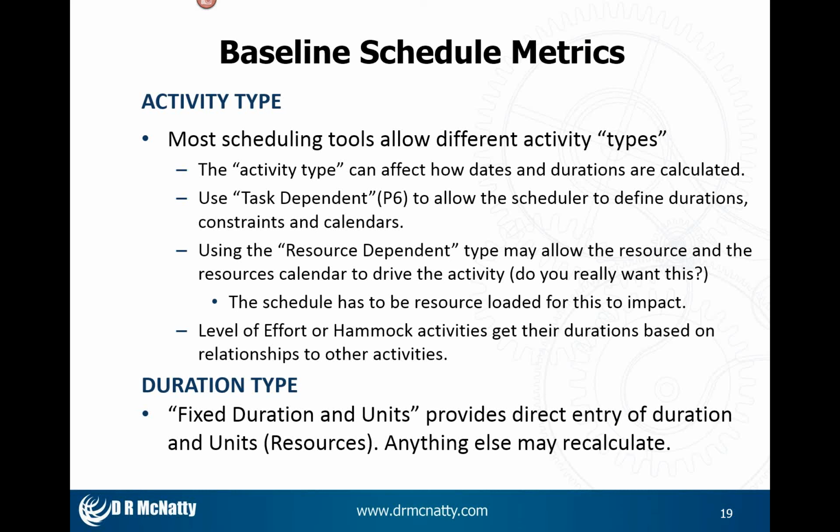Activity type. Most scheduling tools will allow for different activity types. The default, or the most commonly used one in P6, is task dependent. This allows the scheduler to specifically define the duration, define any constraints, and define any calendars. When you have a resource dependent type and the activity is resource loaded, that resource dependent could allow the resource's calendar to drive the activity, and that might not be what you really intended to have happen.